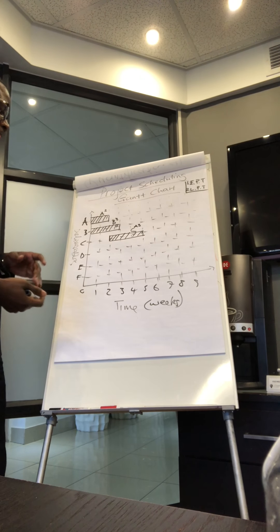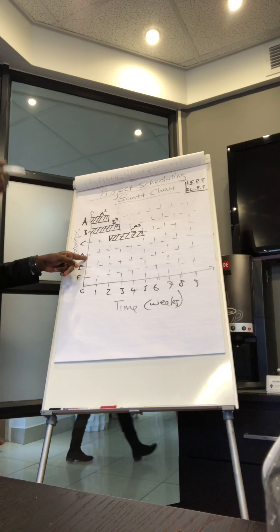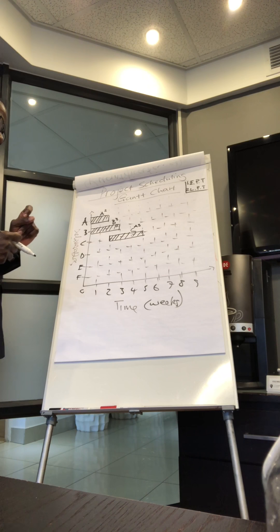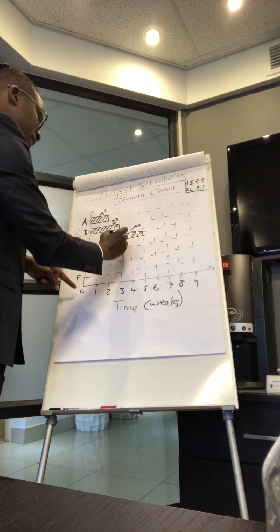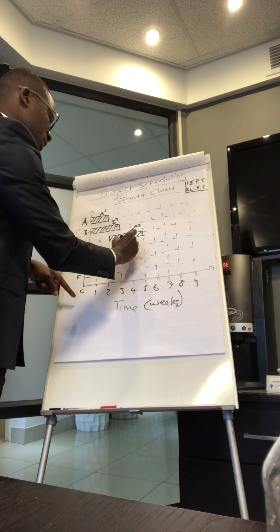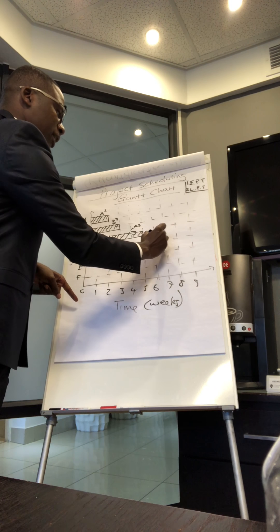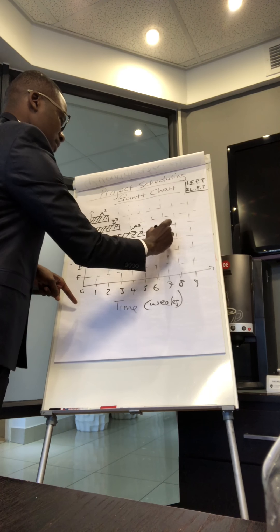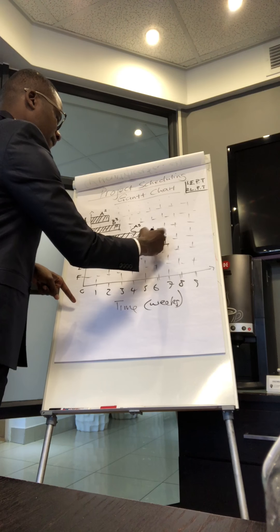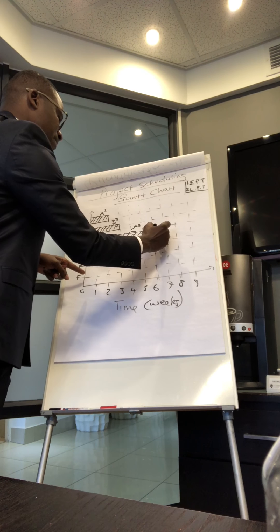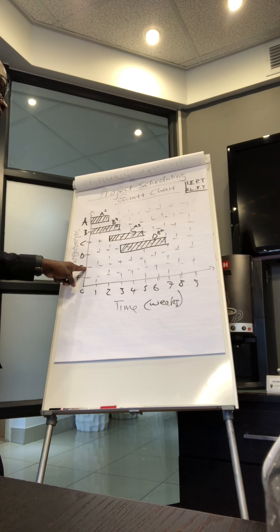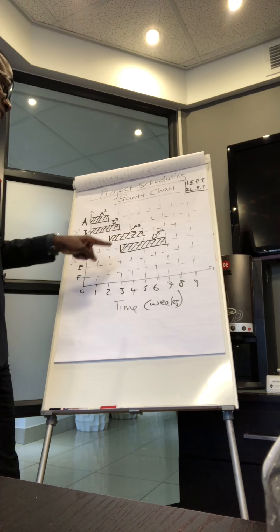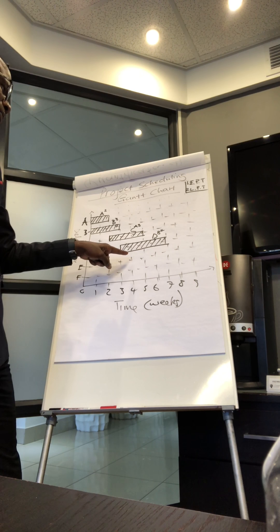Then Activity D, which cannot start until B is finished, takes four weeks. We start from where B ends, and draw four weeks from there. We record this as Activity D depending on B, taking four weeks.